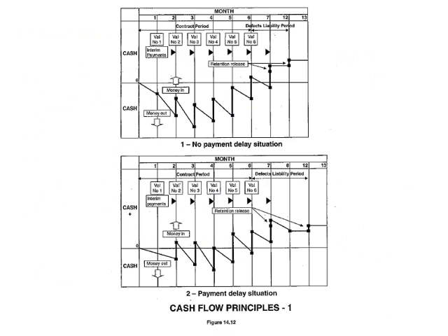Okay, here's that graph that we spoke of. So you can see you have your expenditure in the first month, you put in your claim, then you are doing more work, and you have more cash flow going out, and then you get your first payment. So your cash flow deficit is relieved slightly, but you still have cash flow outflow, and then you only get your inflow here. So you can see how the trend goes, and it's only after month 6 that you start getting a positive cash flow again, although it dips after that month into deficit again.